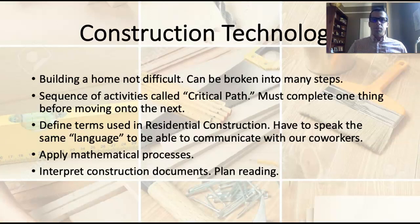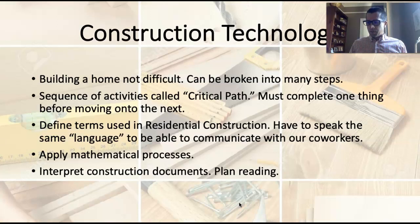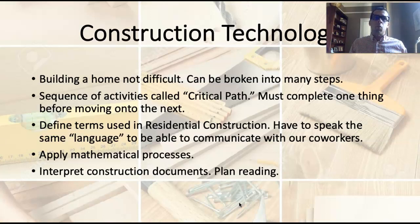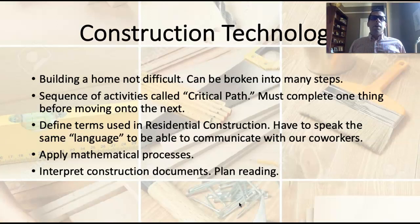Building a home is not difficult after you've done it a few times. When we break it into different components, understand what those components are, how they fit together, and understand the sequence of things that goes into building a house — we call that the critical path. When we understand what needs to happen before the next step can happen, we're following the critical path. We don't want to insulate and drywall a house before the roof goes on, because it might rain and the drywall and insulation could get soaked. There are just things that are supposed to happen in a certain order.